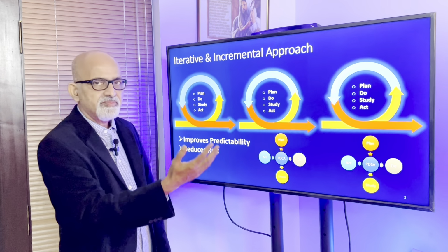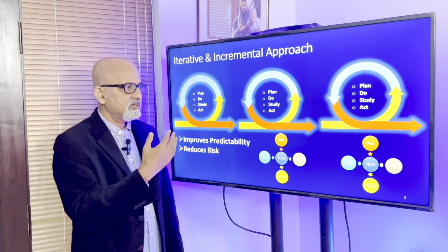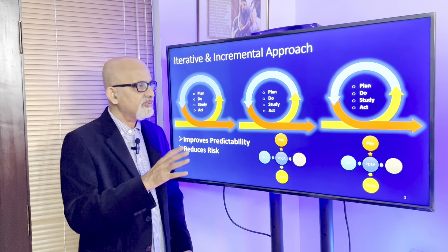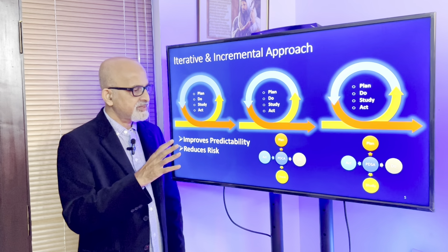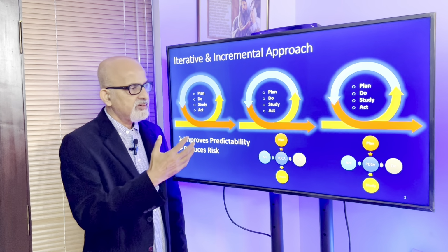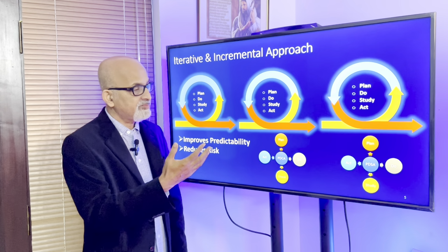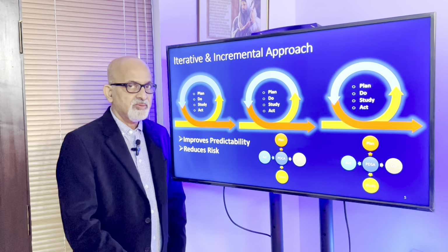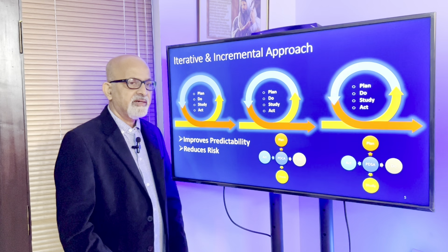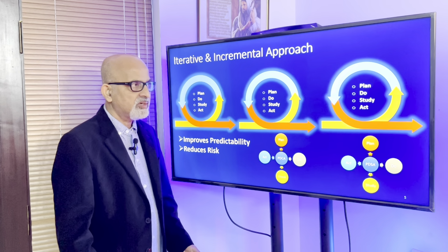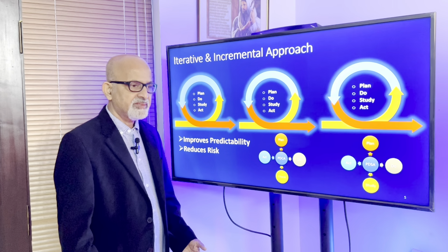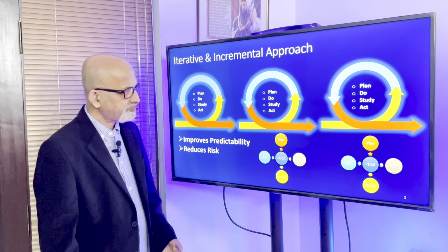So the basic difference between the waterfall model and the iterative or incremental approaches is here everything revolves around an iteration, and waterfall model is always on plan, do, check, and act. Whereas here in the iterative models, it is about plan, do, study, and act. So here we proceed with the assumption that requirements will change, and this model will help us to accommodate changed requirements even late in the project.